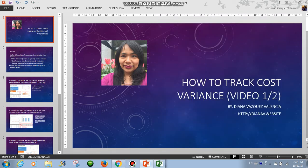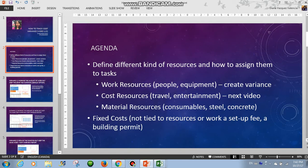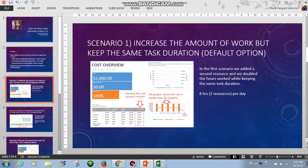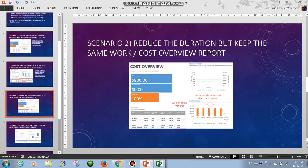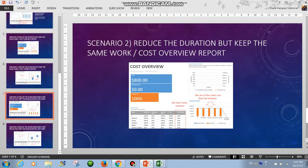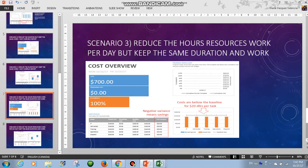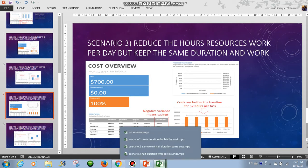Hello and welcome to the first video on how to track cost variance. In this video we are going to focus on work resources, that are people and equipment. Project already has three scenarios that can happen in real life. The first scenario is increase the amount of work but keep the same task duration — that is the default option. Second scenario, reduce the duration but keep the same work. And third scenario, reduce the hours resources work per day but keep the same duration and work. So let's get started.